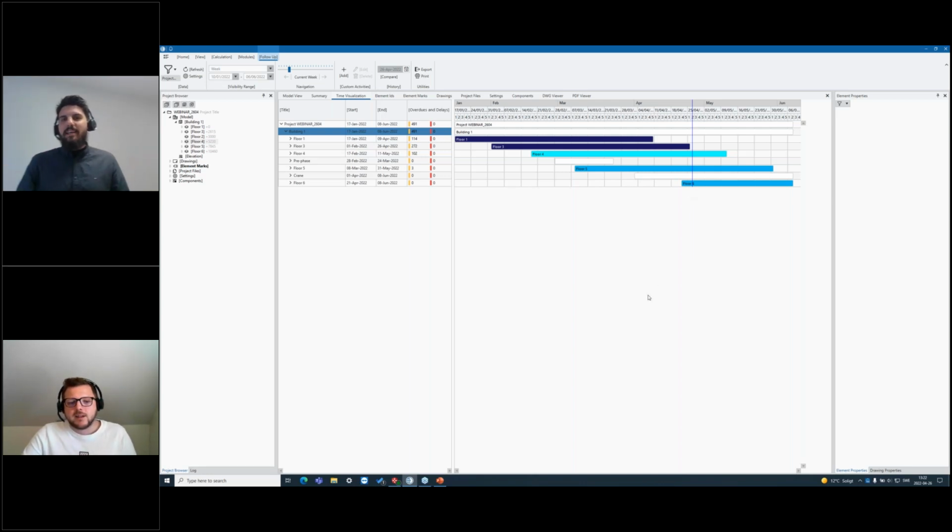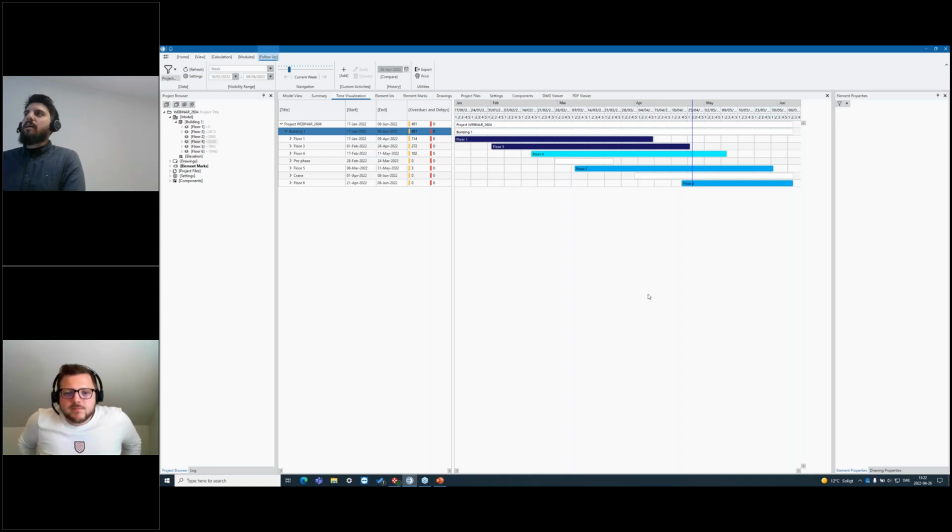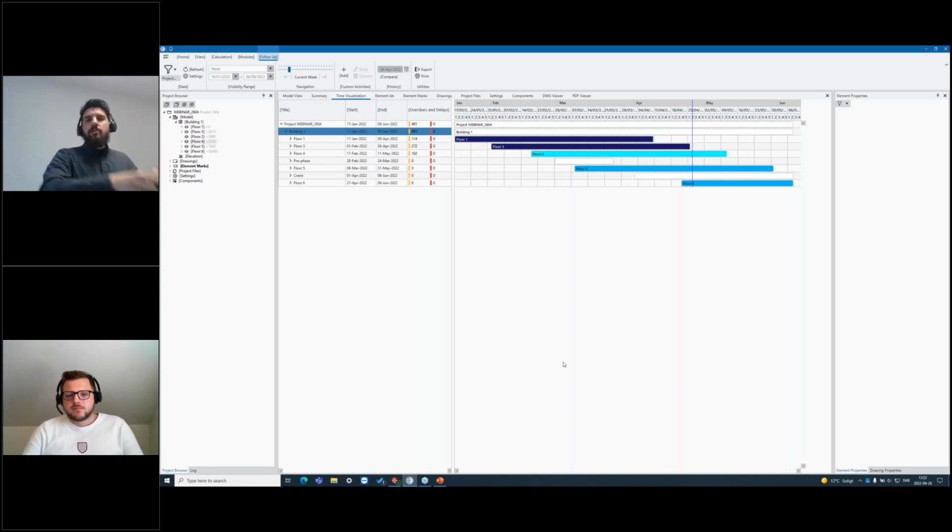Exactly. Basically we say here that, okay, I had planned my walls to be produced and erected on the 10th of March, originally in the beginning, and after I produced them, did all the controls, sent them, made the deliveries and booked the trucks and took them to transport, then I saw that I actually erect on the 15th of March. There were like 5 days off. Okay, that's great. That's amazing. Yes. So you can see different stages.